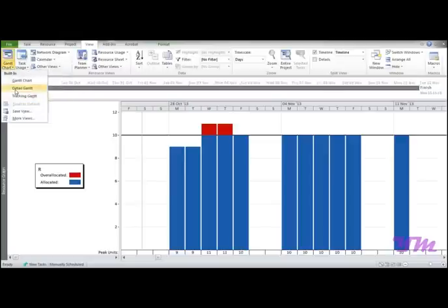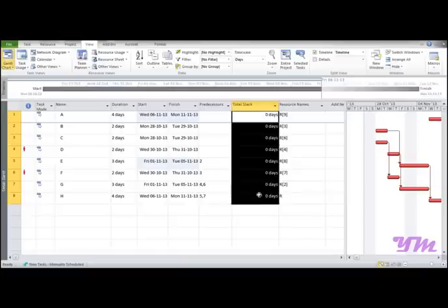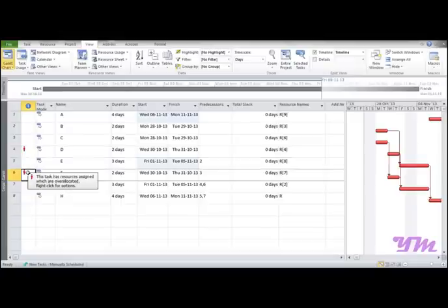Now getting back to the detailed Gantt, you can see the available Slack is 0, so all the Slack is consumed over here in order to balance the resources. Still, you can see these two red markings which say the resources required are more than allocated. So one thing you can do is increase the duration of the task if possible, or reduce the demand for resources to complete that work. So this is all about resource leveling in Microsoft Project 2010.